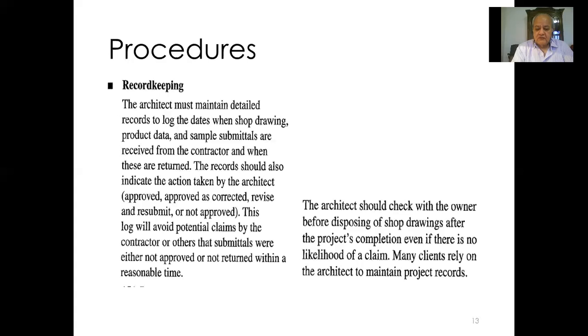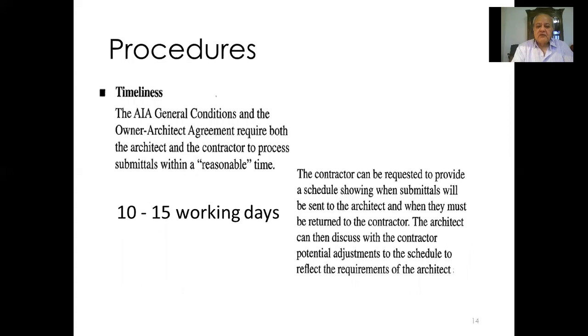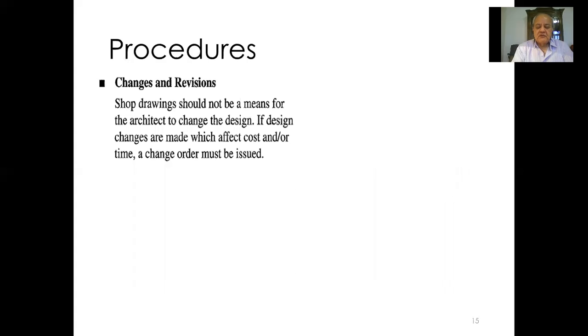Keep the owner involved. Sometimes the owner has their own representatives on the site if it's a big site. So this is an entity that you have to keep involved all the time in your actions. The project is not yours. The project is owned by the owner. You are a representative of the owner only. As you said, 10 to 15 days is a reasonable time. Less than that is appreciated, so that there is no delay.